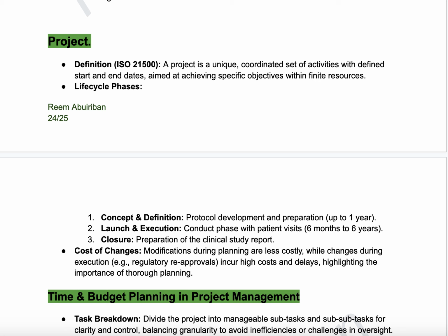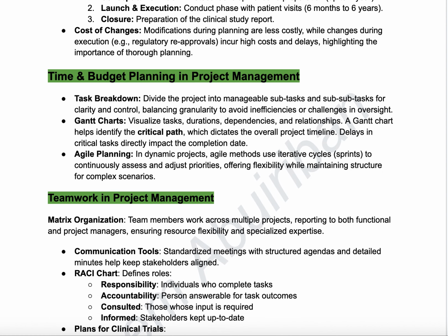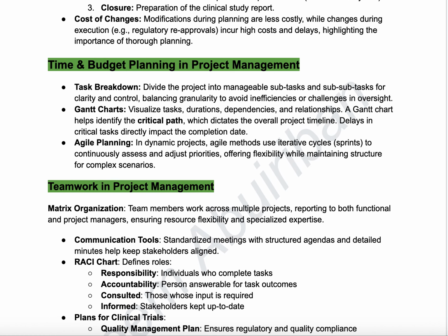Cost of changes: modifications during planning are less costly, while changes during execution, for example regulatory reapproval, incur high cost and delays, highlighting the importance of thorough planning. Time and budget planning in project management.